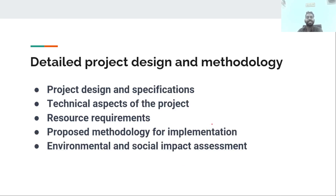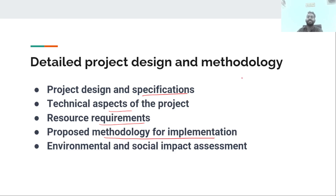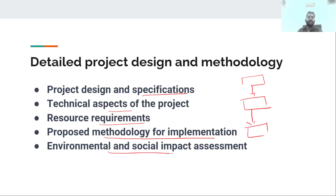For the detailed project design and design methodologies, we need to define: what is the design of the project, the specifications, the technical aspects, and the resource requirements. For the methodology of implementation, first we need to do land acquisition, then carry out a bidding process for the contractor, manage that process, and also conduct an environmental and social impact assessment.